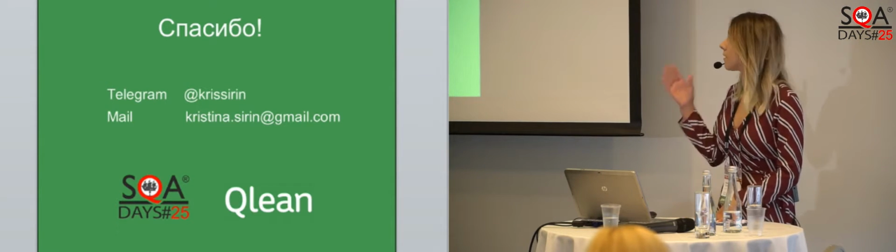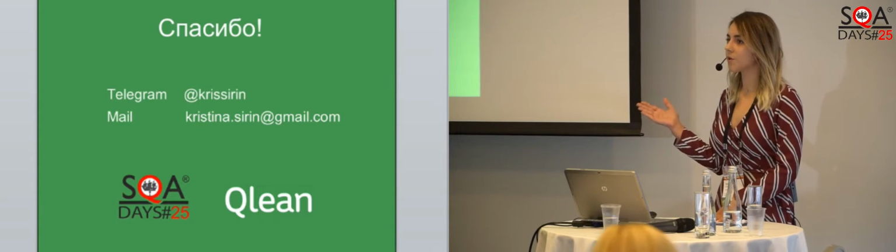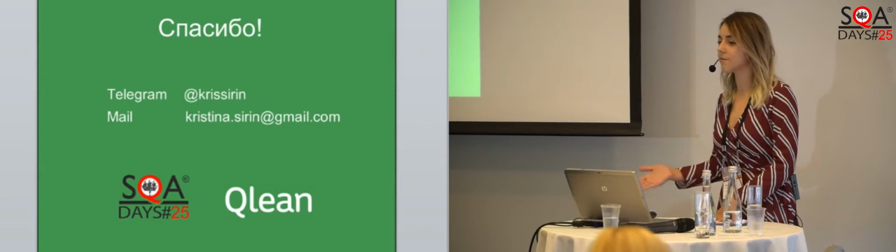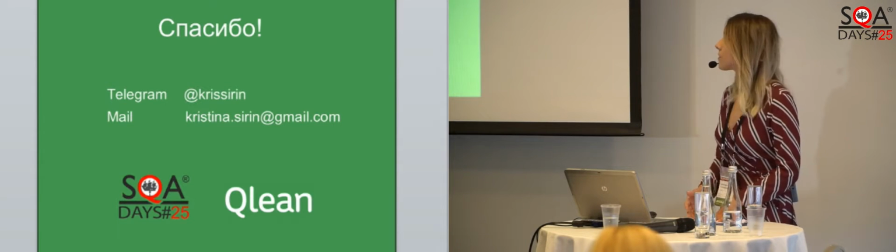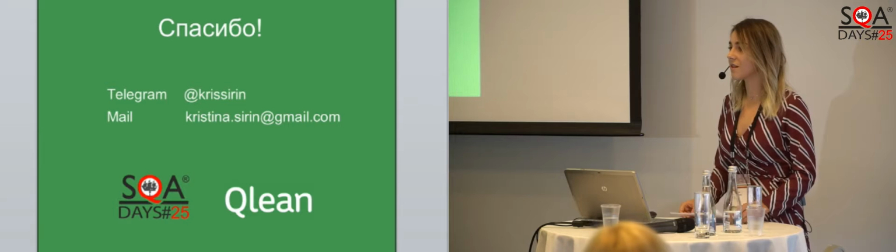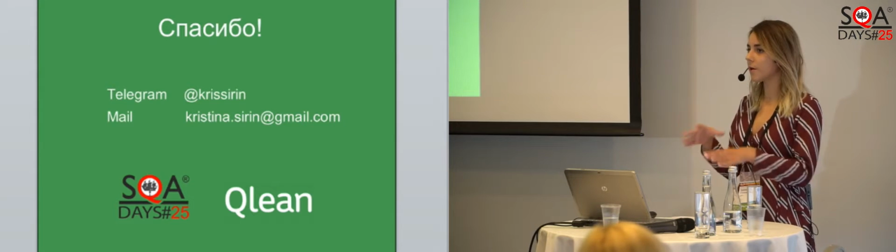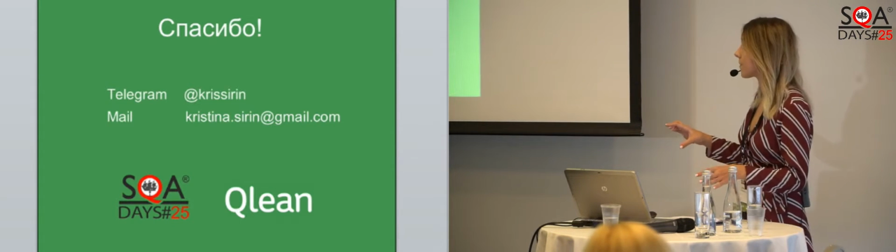Yes, we do. We use another additional tool. It is not a key tool, it's just only a magic wand, which we sometimes use if there is a need, and if we believe that this is a painful problem for a user, or some product is not being bought, and you still believe that this is a priority, then you could use such a tool. And we use a matrix of user pain. It consists of 3 elements, which includes the type of a bug, the possibility of bug occurrence, meaning how many users have it. Maybe only users of Android platform experience these bugs, which is less popular in iOS. And the third criteria is the priority.